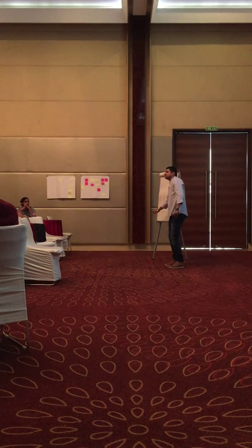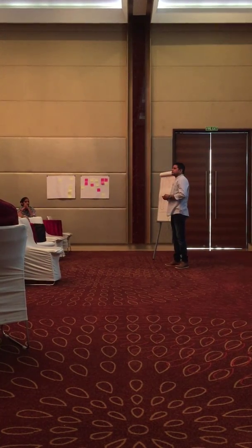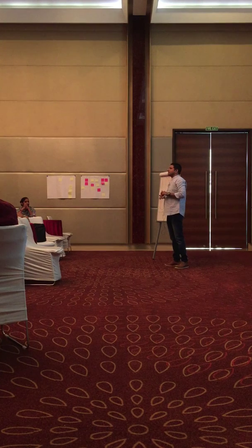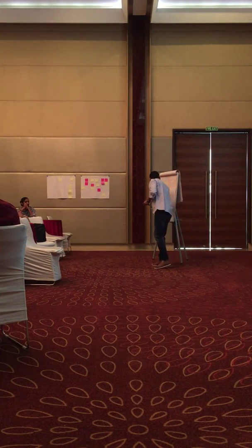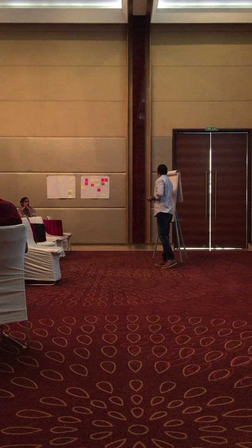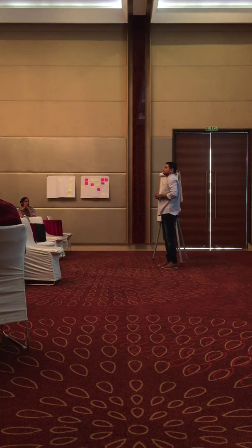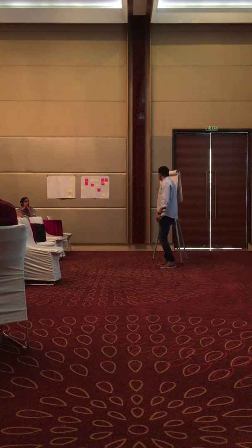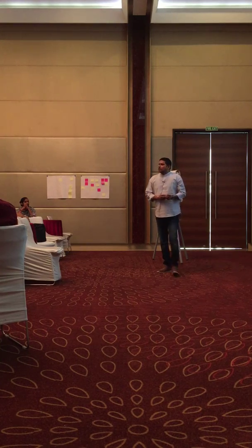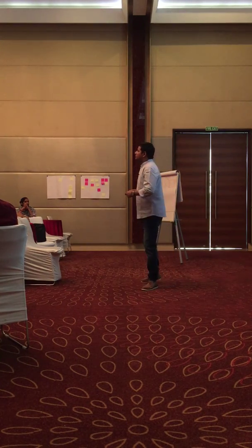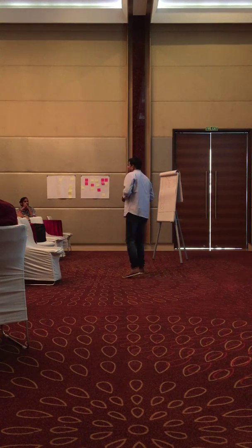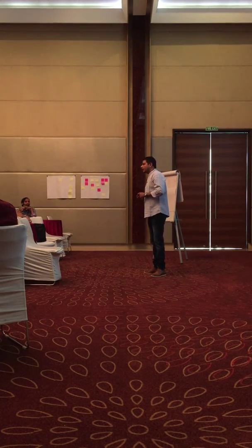Items here are abstract, very high level. I may see this item as this, and I may see the item here as this. But when it moves up the backlog in prioritization, it gets smaller and smaller so that it may meet this criteria. Who will do that? Together, the product owner and the development team, in an activity called product backlog refinement.